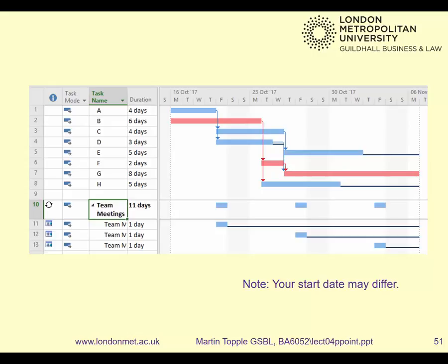And there are ways of adding recurring tasks into your project, and we'll do that. We'll say all the managers get together on Friday and work out what happened last week and what's due to happen next week. And then they get together and find out did it happen and what's going to happen next week. And that sort of focuses the attention of your project team. So a recurring task can be quite a good idea in your project. And you might recognise this project. Does anybody recognise it? It's the one you did in week 1 when you learnt how to use Microsoft Project. So load up that project and add in the recurring tasks just so you can understand how they work.